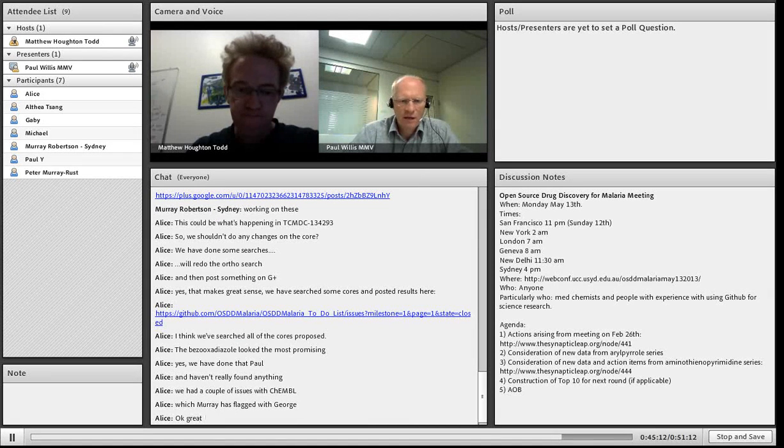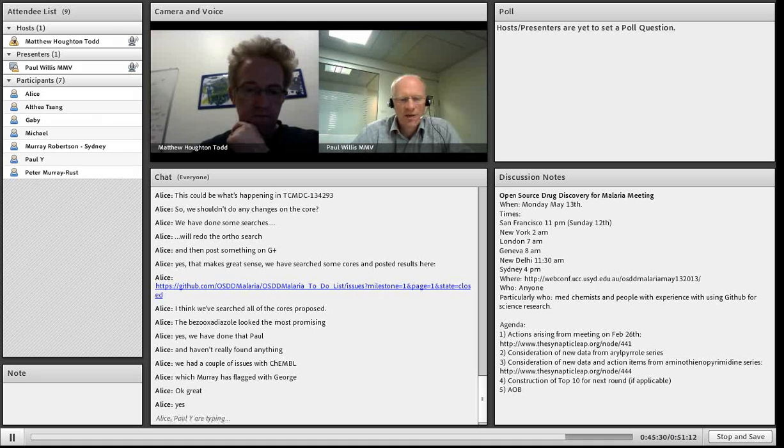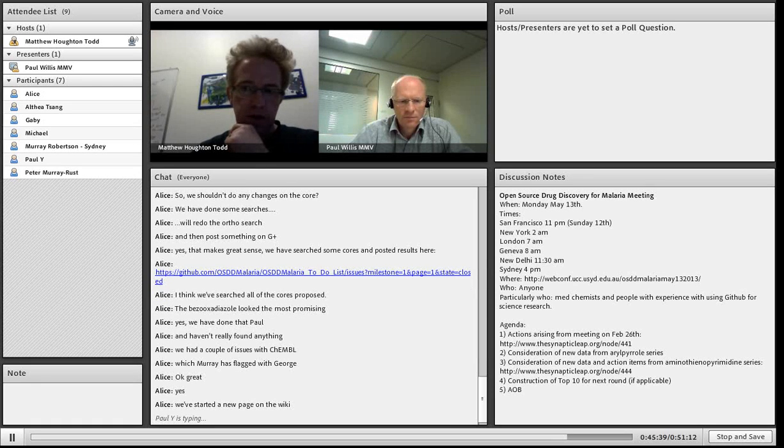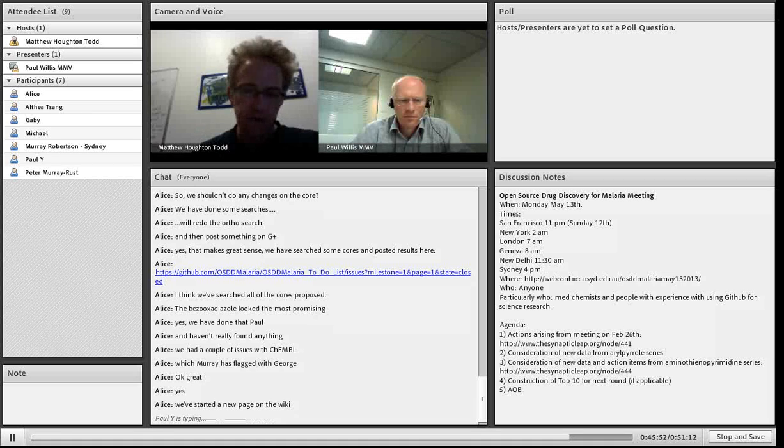And I guess the other action probably is that it would be good to start to have a mitigation plan. There is a chance that this series isn't going to have the SAR, so perhaps starting to identify alternate series would be a good thing to think about. Certainly, yes, we started that. I think Alice is about to share a link to a wiki page. Alice already did some analysis of one possible other series from the GSK paper, scoping out what's known, and we sent that back and forward internally to discuss what was needed.